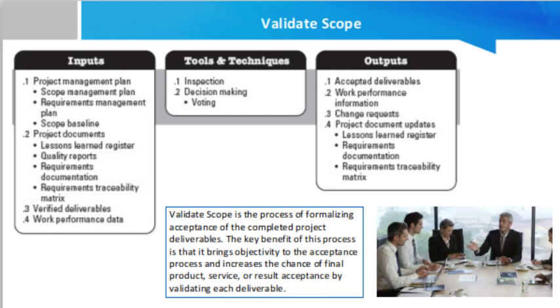Change request. It is essential that all final deliverables be entirely accepted by the stakeholders, and such unaccepted deliverables are documented along with the reason for non-approval. In such cases, the deliverables will require changes, and that is when the change request process comes into effect to repair the defect. After the change request is executed, it is reviewed through the perform integrated change control process.